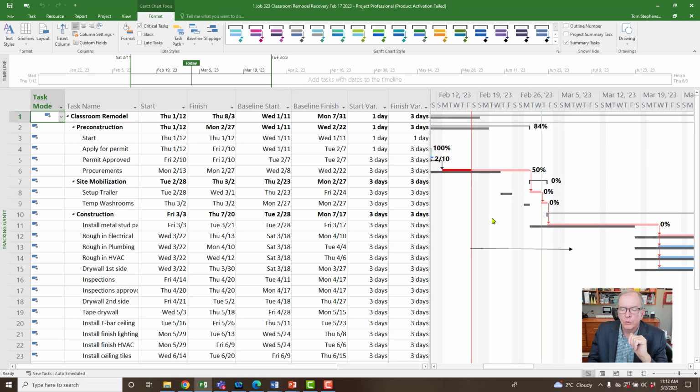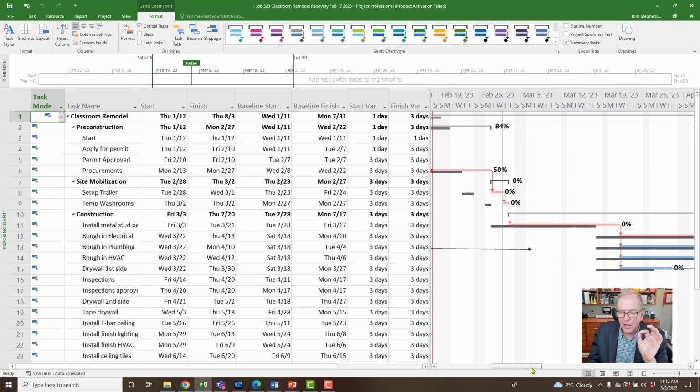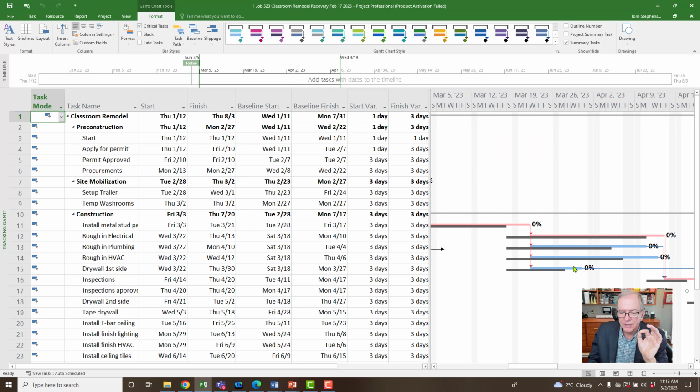I'll talk about the direct method that I've developed in an upcoming video as well, so that you have a process and a framework to follow. But typically, we want to think about looking along the critical path. That's the first thing. I always say detect along the critical path. It's not helping us to shorten this. It's not on the critical path. It's got lots of float, so that won't help us.